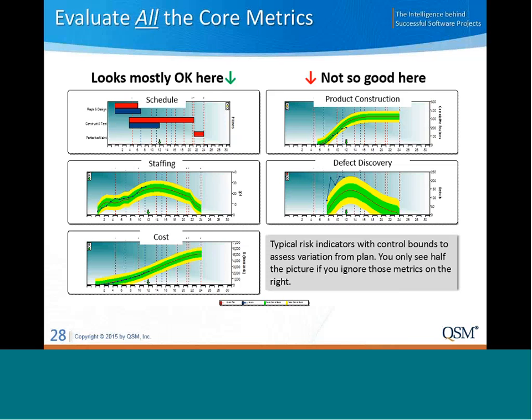With some determination, you can find out how much code has been developed and unit tested, for example, going into a configuration management system. Same thing with defects. You can go into the defect tracking database and see how many defects have been discovered over time and by severity. Whereas on the left side, certainly with schedule milestones and tasks, those can be fudged a little bit. It can be subjective when tasks are completed and what percentage complete you are. And of course, the consumption of costs and staffing is more backward looking on what's been consumed to date.